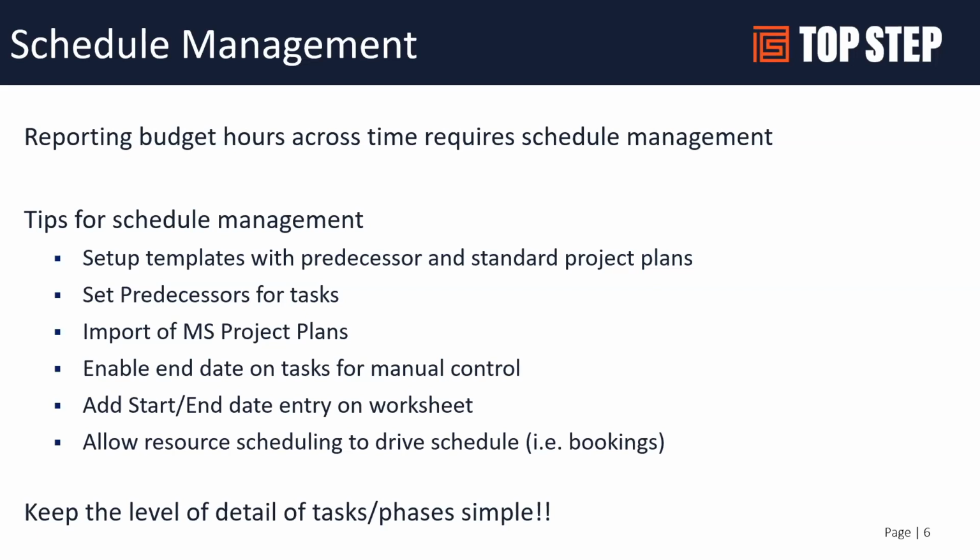So some tips that we see customers benefiting from is using templates to set up your projects, and within those templates you could have a baked in project task structure, and that really can give you a head start to getting that project plan, project schedule, if you're using your task structure to drive your project schedule. And we'll talk a little bit about more details there.